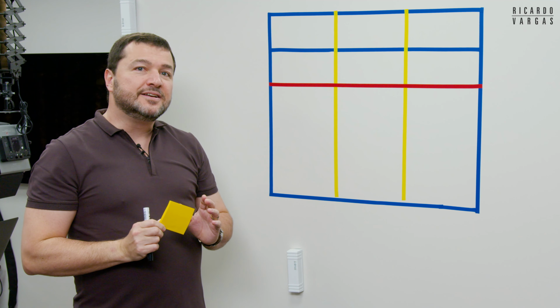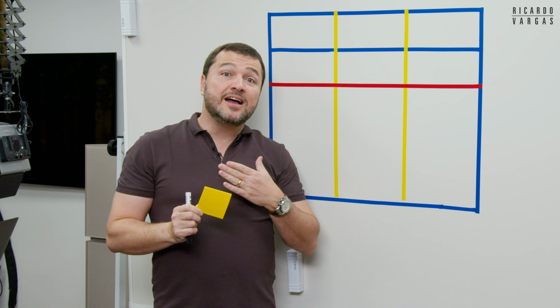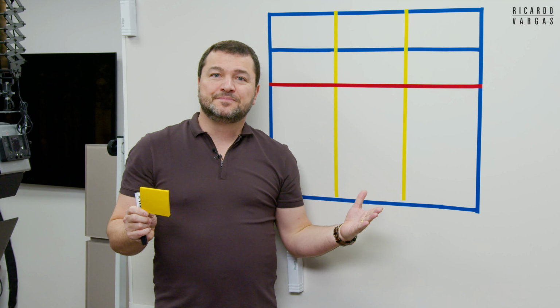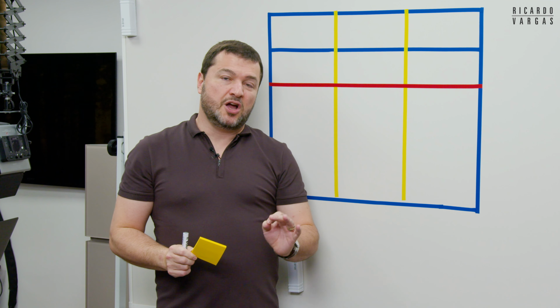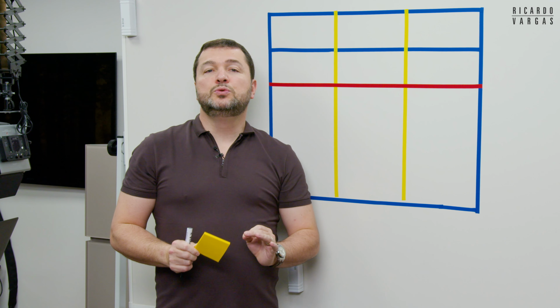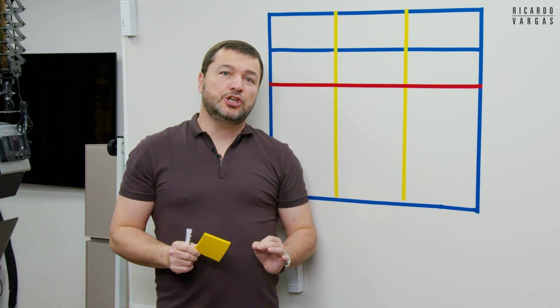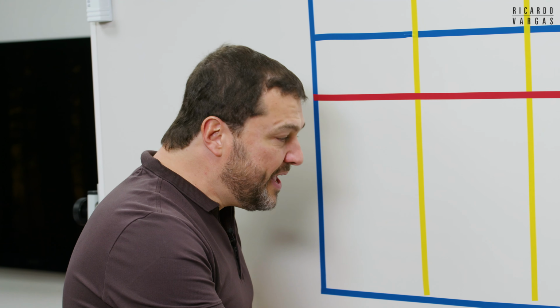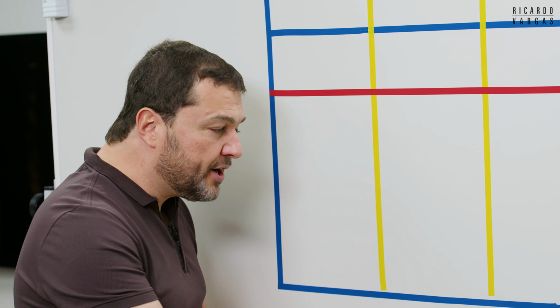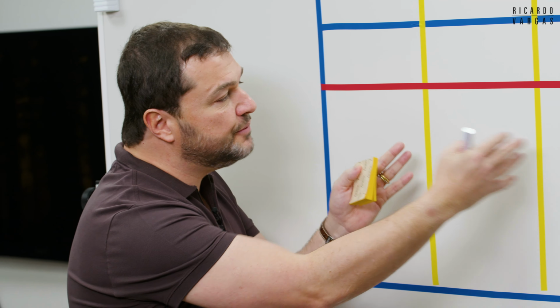The second one, and probably for me the most important one, is the control of work in progress. Why do you use Kanban? You use Kanban because you want to avoid multitasking. You want to avoid having so many things just parked in one intermediate step without producing and delivering any value.